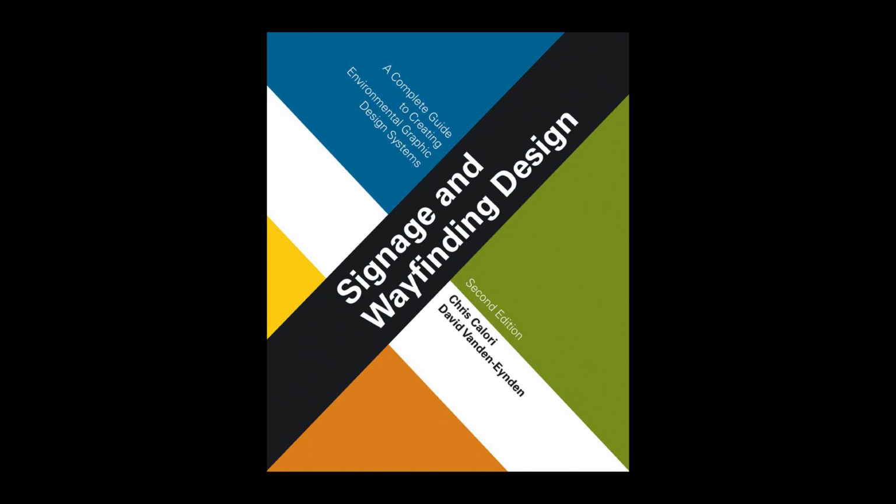Bidders are typically required to send an RFI to the owner's representative, who in turn routes the RFI to the EG designer, often via the project architect, if one is involved. The designer then responds via the same channels, usually within a requested time period.